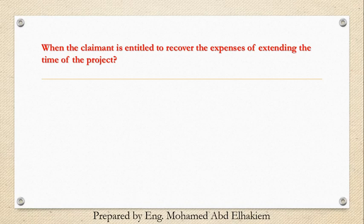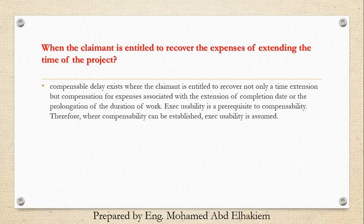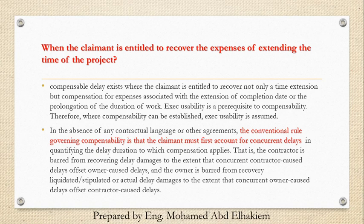When is the claimant entitled to recover the expenses of extending the time of the project? Compensable delay exists where the claimant is entitled to recover not only a time extension but compensation for expenses associated with the extension of the completion date or the prolongation of the duration of work. Excusability is a prerequisite to compensability. Therefore, where compensability can be established, excusability is assumed. In the absence of any contractual language or other agreements, the conventional rule governing compensability is that the claimant must first account for concurrent delays in quantifying the delay duration. That is, the contractor is barred from recovering delay damages to the extent that concurrent contractor-caused delays offset owner-caused delays, and the owner is barred from recovering liquidated/stipulated or actual delay damages to the extent that concurrent owner-caused delays offset contractor-caused delays.